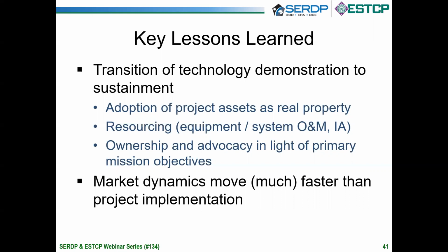The resourcing, the system. So this system, from a cybersecurity standpoint, has some fairly significant upkeep requirements, and that is something that ultimately needs to be kept in mind as we move forward with the project. And at this installation, they have pretty limited capability to do the cybersecurity and information assurance upkeep. And then somebody's got to actually just maintain the battery systems. So we're still working at ESTCP to provide those services to Raytheon with subcontractors until such a time that we transition the system over to Air Force Civil Engineering Command and the Air Guard to continue to resource the operations and maintenance and cybersecurity posture maintenance.